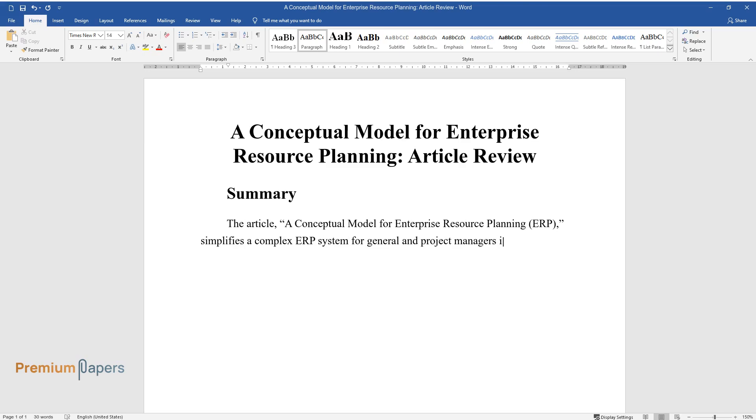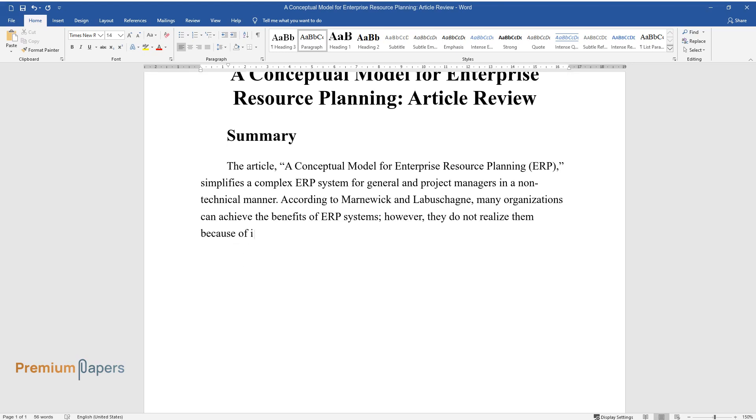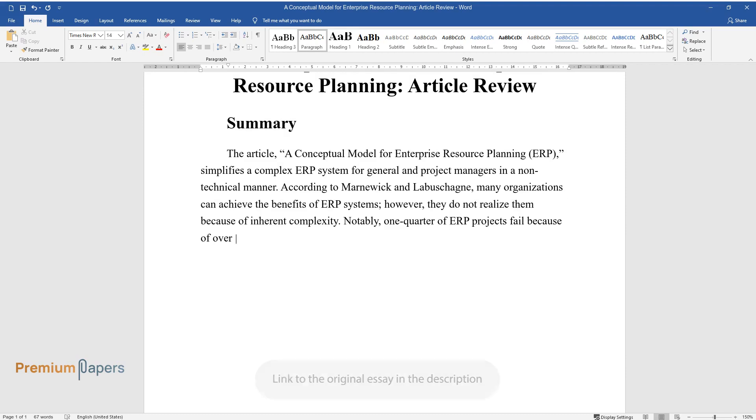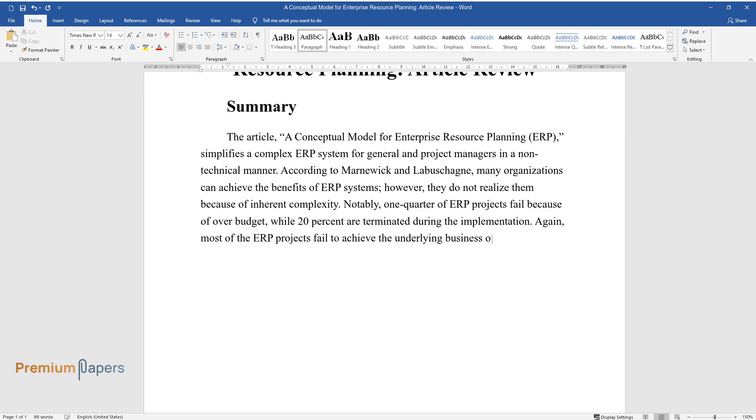According to Marnwick and Labashane, many organizations can achieve the benefits of ERP systems, however they do not realize them because of inherent complexity. Notably, one quarter of ERP projects fail because of over-budget, while 20% are terminated during implementation. Again, most ERP projects fail to achieve the underlying business objectives one year after their implementation.